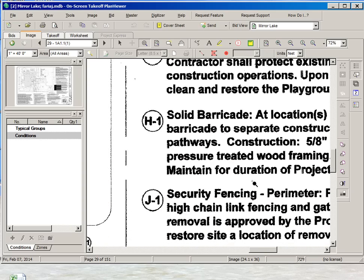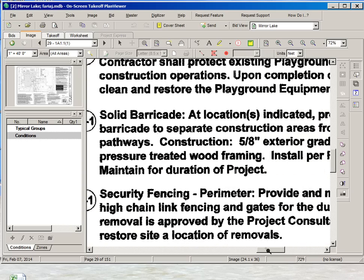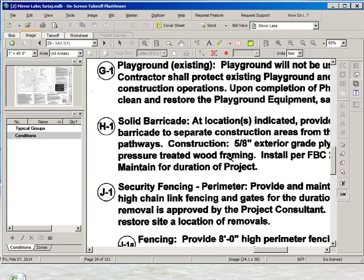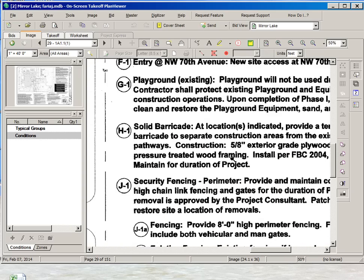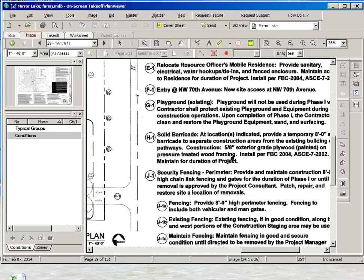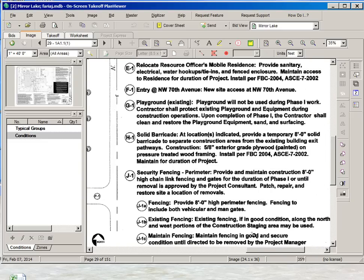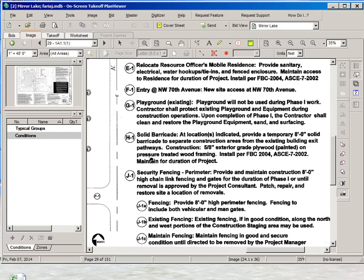So if we go to the description of work we will see that H1, it's a solid barricade. So this solid barricade is going to be different from the safety fence. The solid barricade is going to be 8 foot high solid barricade made out of 5/8 exterior grade plywood painted on pressure treated wood framing. So it's going to have different materials, different cost.